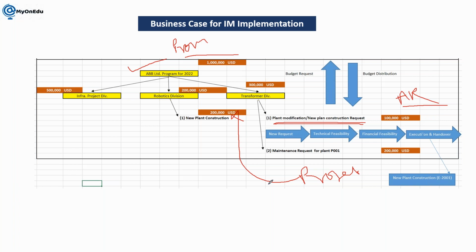And if it is not formed, and any idea is there, then an appropriation request will be created. Whatever amount comes from the planning in the appropriation request or from the project will be rolled up to your last level of position and further to the top level of position. Here management can manage it. They will understand what exactly the cash flow is that they need to consider in upcoming years, and it will be approved.